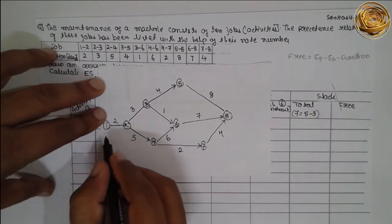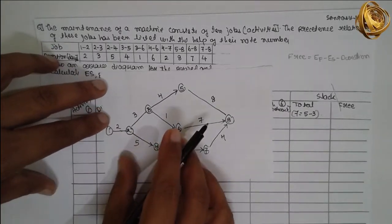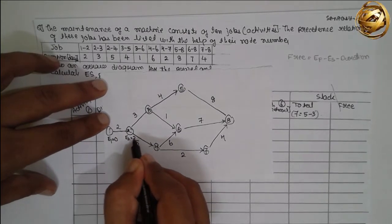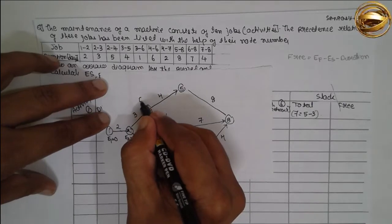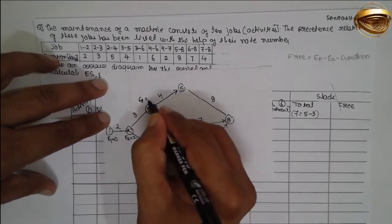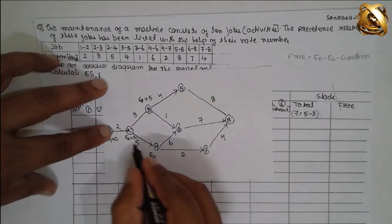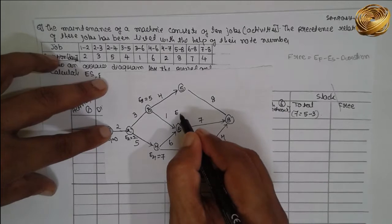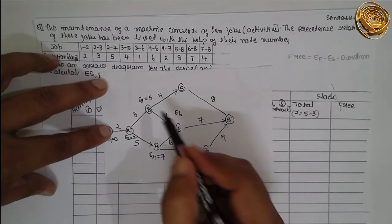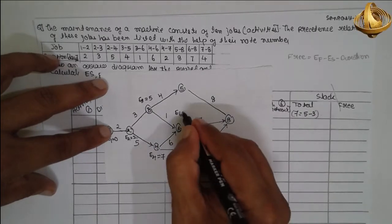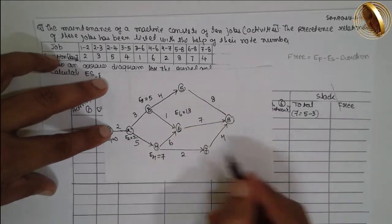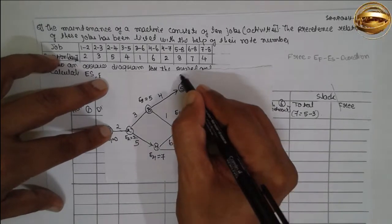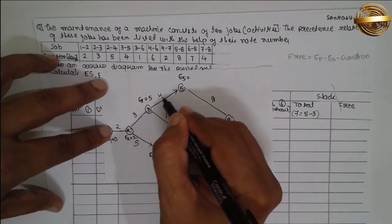Now I will find out the earliest time and finish time. E1 equals zero. Zero plus 2 — E2 will be 2. E3: take max of 2+5 and 2+3, which gives 5. E4: 5 plus 2 equals 7. As we move left to right at a junction, we select the larger value. E7 equals 7 plus 2 equals 9. E5 equals 5 plus 4 equals 9.